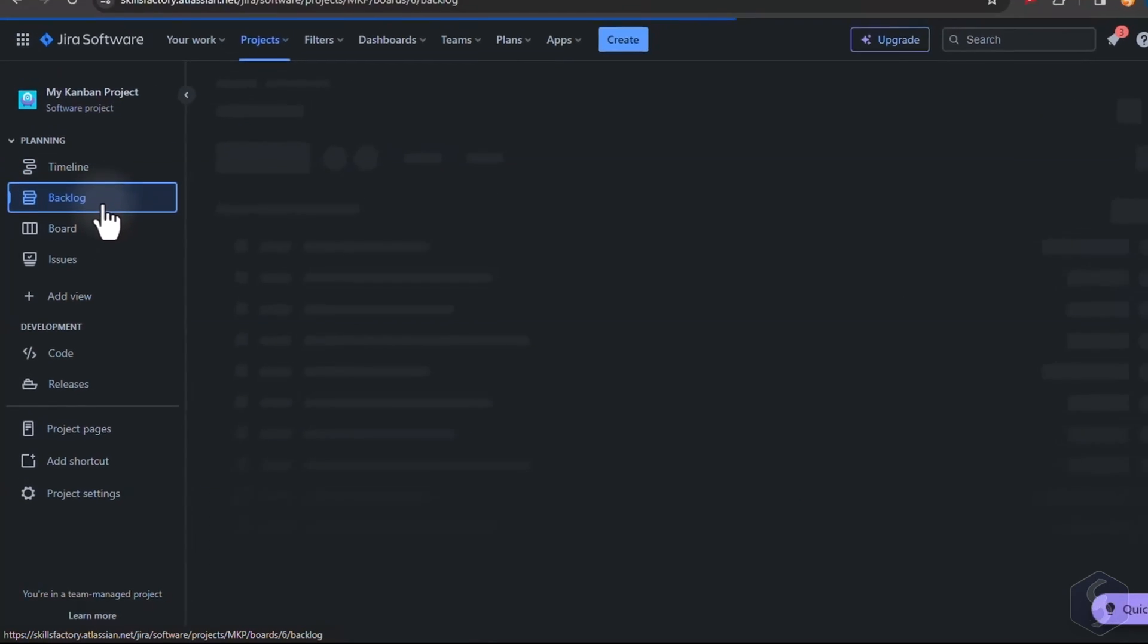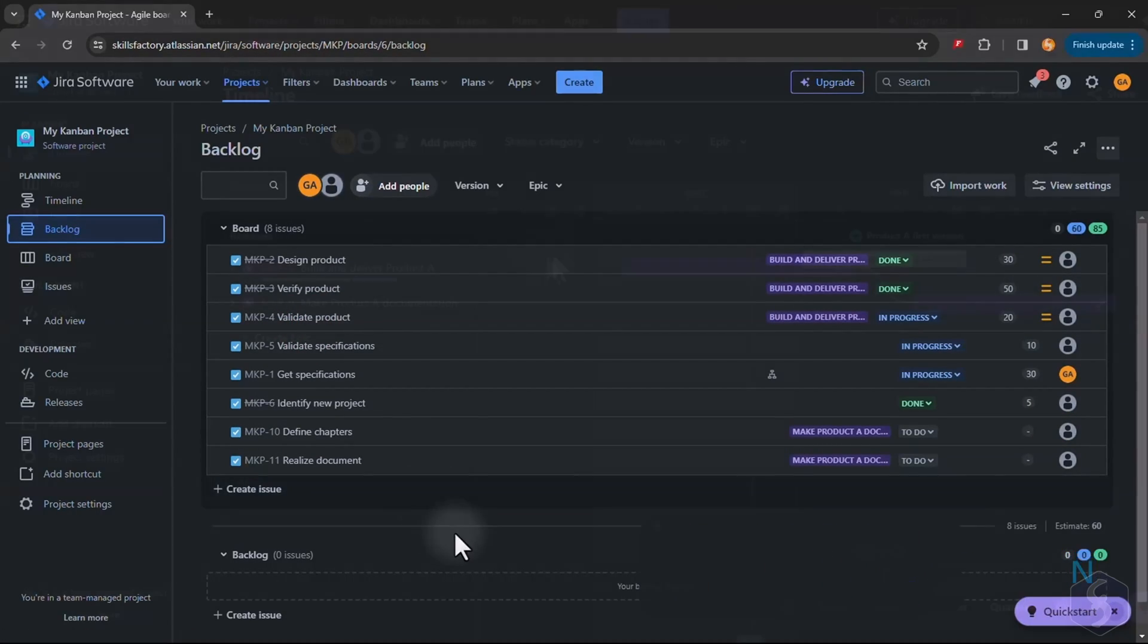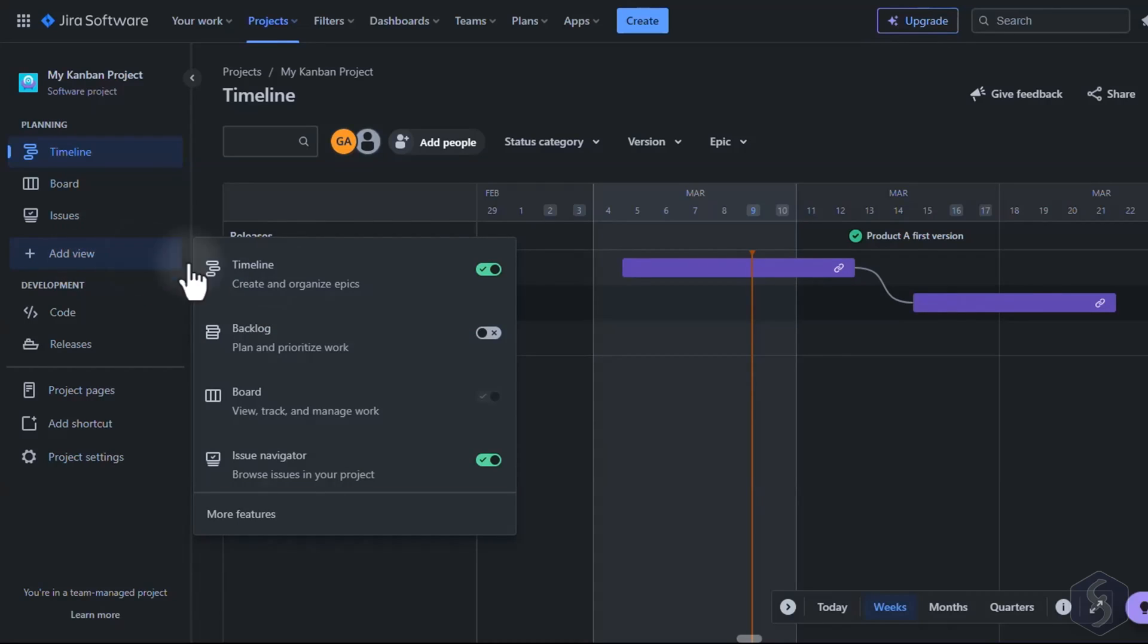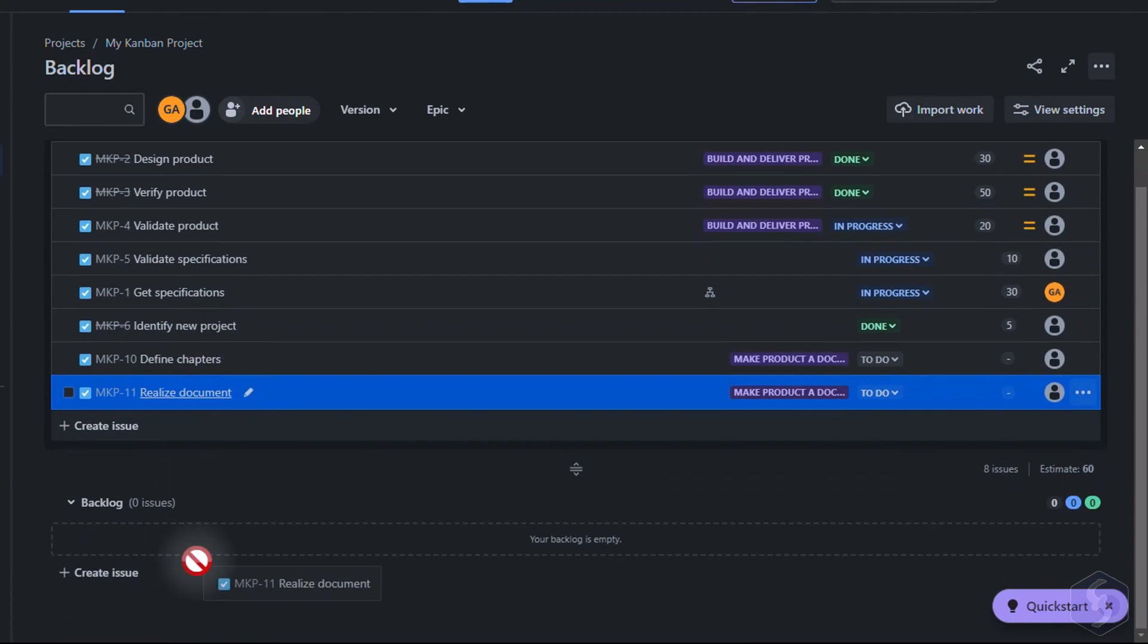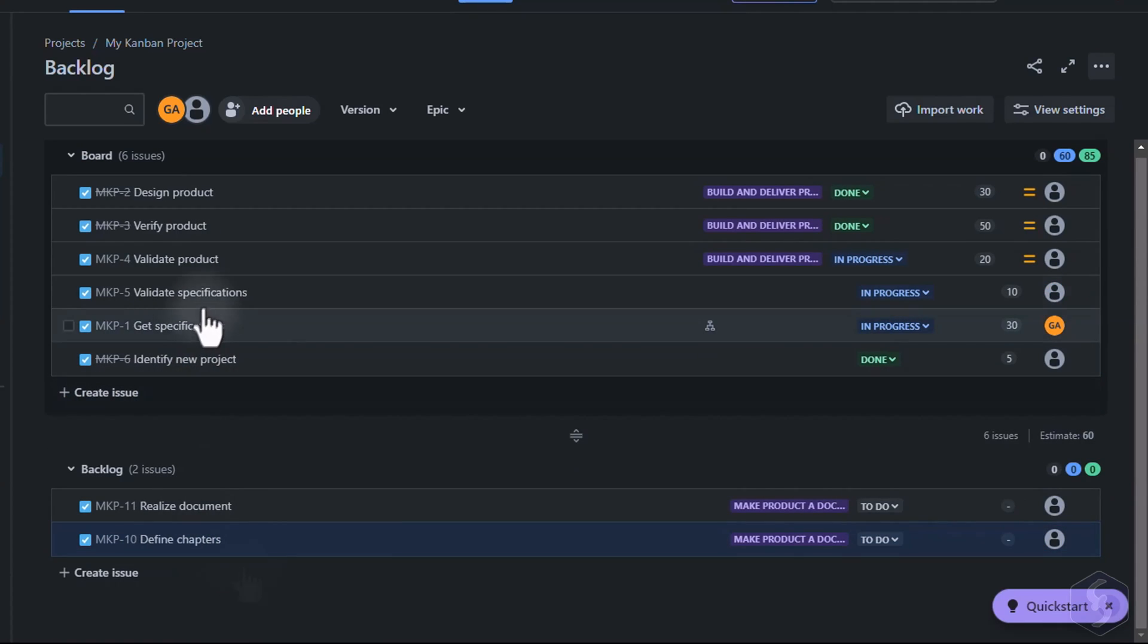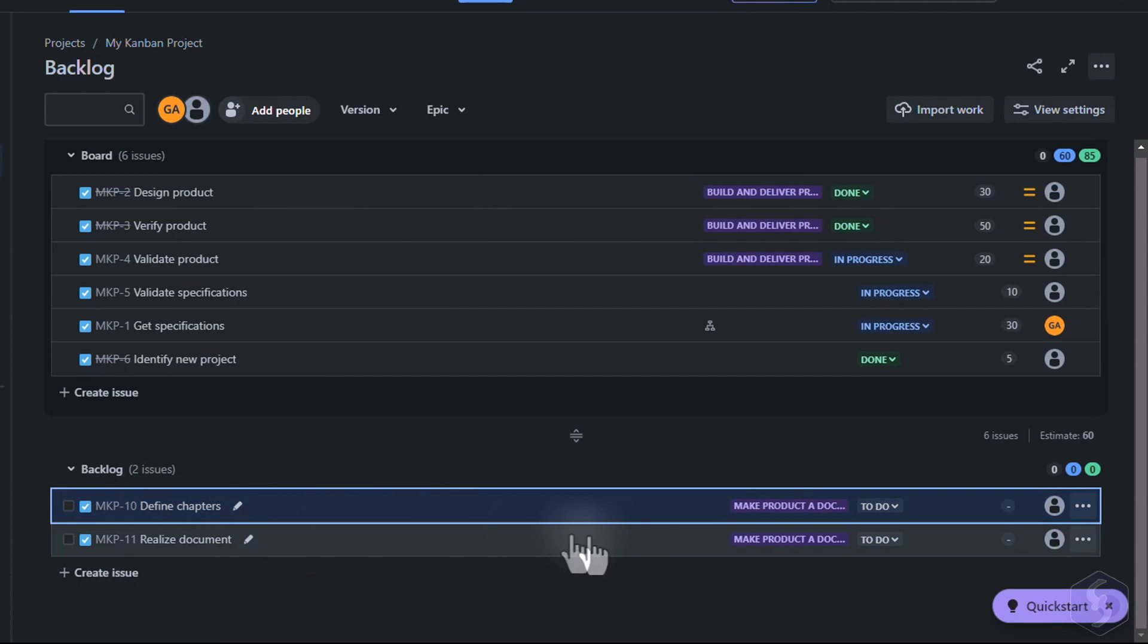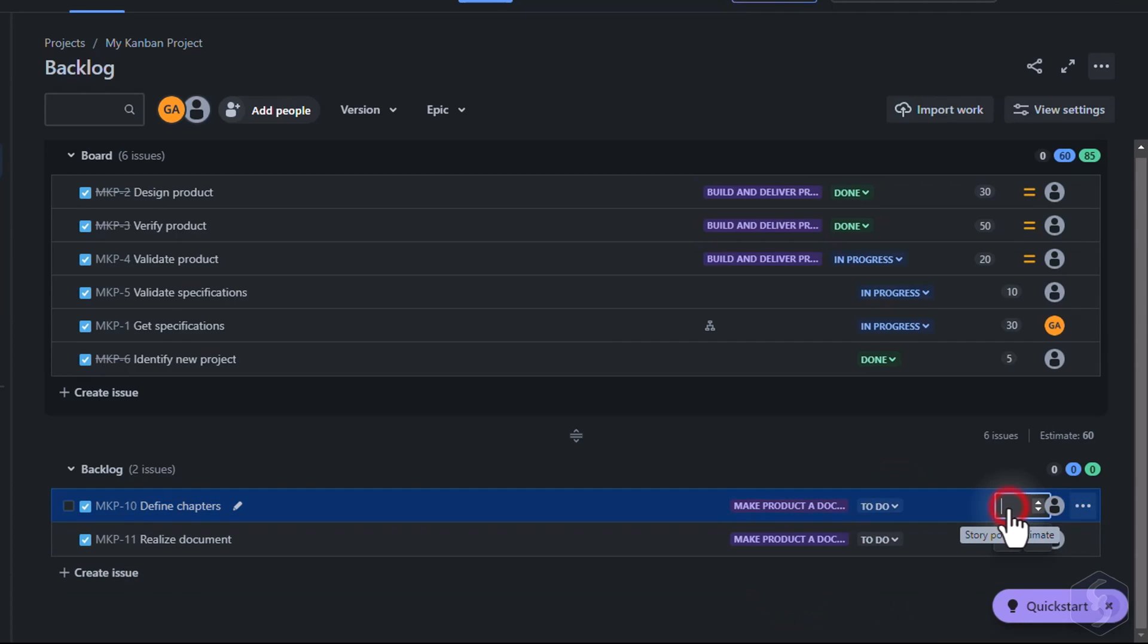Use the backlog to handle independent or urgent issues. You can show it from the Add View List. Here drag any item from the Board List to the Backlog below and arrange them in the correct order of priority for your team. Make sure to adjust Status, Story Points and Assignee as needed.